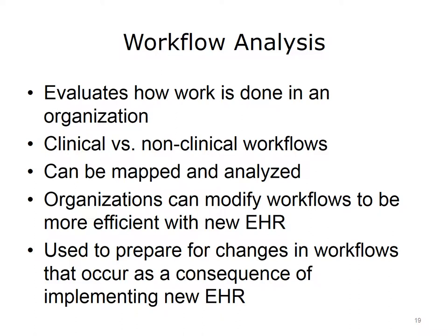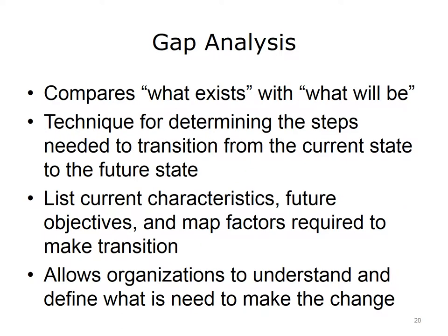Workflow analysis also allows organizations to become aware of and prepare for the changes in workflows that will occur as a consequence of implementing a new EHR. Another useful tool for preparing for the migration to an EHR is a gap analysis. This type of analysis compares the conditions that currently exist within an organization with those that will exist after implementation of the EHR. The difference between the two sets of conditions is the gap.